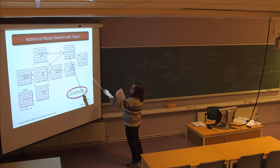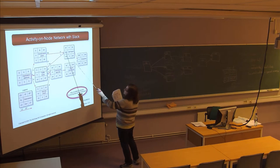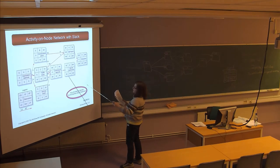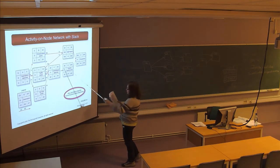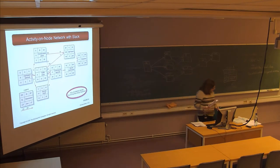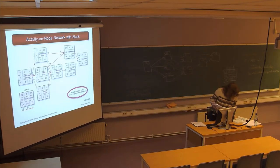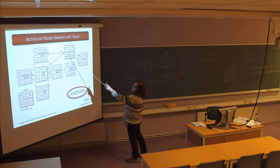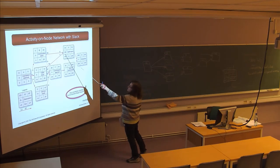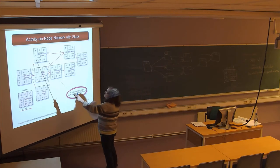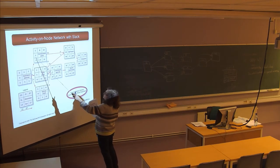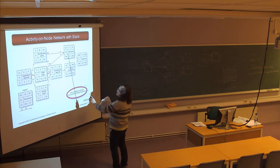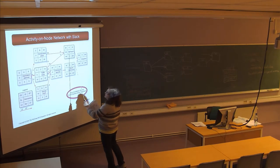Here we have a total slack of 165, and the total slack at another node is zero. So the free slack here is also 165. But the free slack at a preceding node in the chain is zero, because it's part of the chain. The only place there's free slack is at the end of the chain of a series of events.